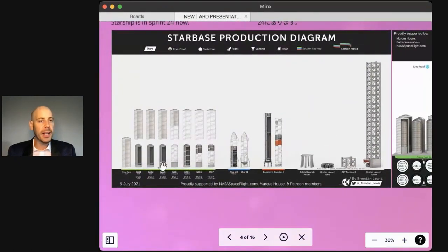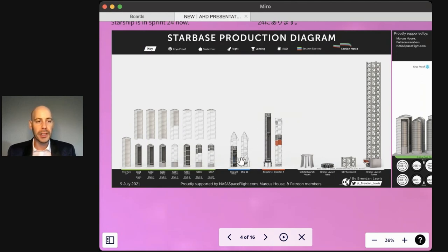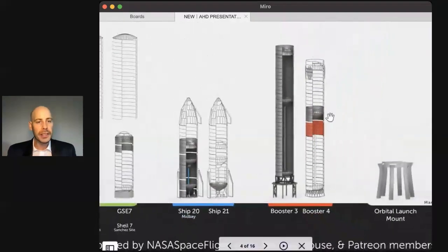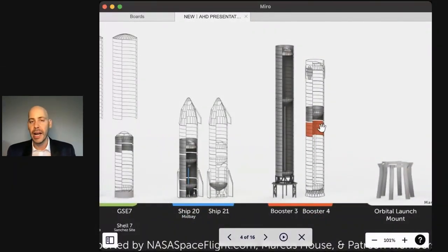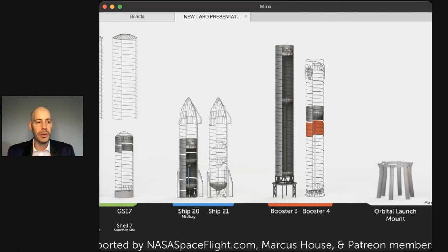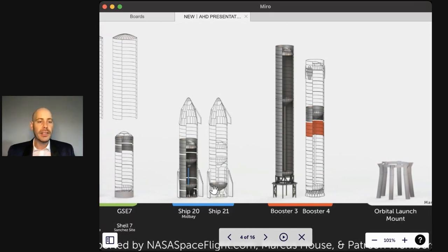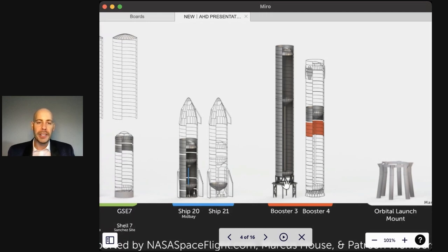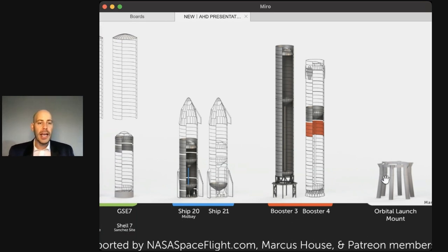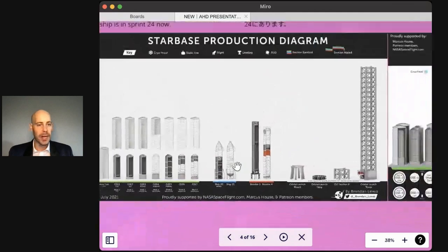Here are the parallel executing modules of Starship. Because of known stable interfaces at the top and bottom of Booster, Starship and Booster, or first and second stage, can be developed at completely different rates. Booster in this image is on version 4. Booster now is on version 7. Starship is on Starship 24. Notice how much faster Starship is iterating than Booster. Starship and Booster both consume Raptor engines. Raptor engines are designed and built on a two-day cycle, and no two of them are the same, ever. They're always innovations to try to be lighter, faster, higher thrust. As long as the interface mates, Raptor engines attach to both Booster and Starship. They're completely separate work streams. This is part of their modularity.